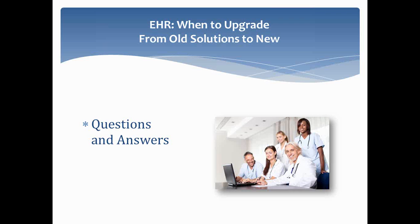But generally, you hope to have 6 to 9 months lead time at least in planning and data conversion activities, training, education first, then specific training, data cutover, and then a period of, quote, settling in of the system. And that would be the minimum for maybe a smaller practice. For larger integrated delivery systems, you're looking at 15 months to do an effective rollout. And depending on if you're implementing some major new capabilities, CPOE is a real challenge. If you don't have a solid base of that already, you're going to take an extra 6 to 9 months, probably minimum, to get that effectively running.